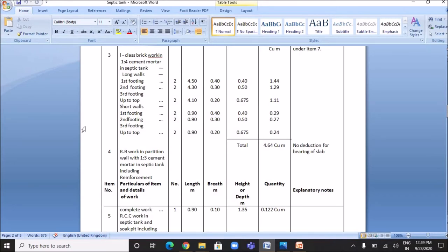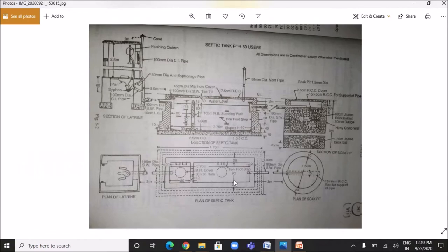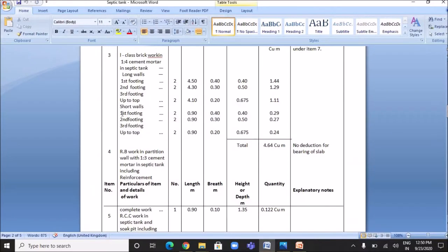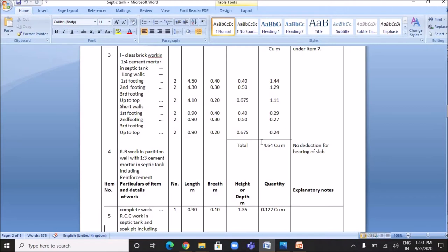For the short walls, the number is 2 and the length is 0.9 meters. For the first footing: breadth 0.4 m, height 0.4 m, quantity 0.29 cubic meters. For the second footing: breadth 0.3 m, height 0.5 m. For the third footing: breadth 0.2 m, height 0.675 m, quantity 0.24 cubic meters. The total quantity involved in first class brickwork is 4.64 cubic meters.